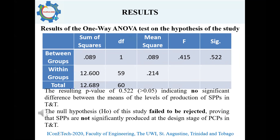The results of the one-way ANOVA test on the hypothesis indicated that no significant difference between the mean and the level of production of subsidiary project plans in Trinidad and Tobago existed. Therefore, it failed to reject the null hypothesis, proving that subsidiary project plans are not significantly produced at the design stage of public construction projects in Trinidad and Tobago.